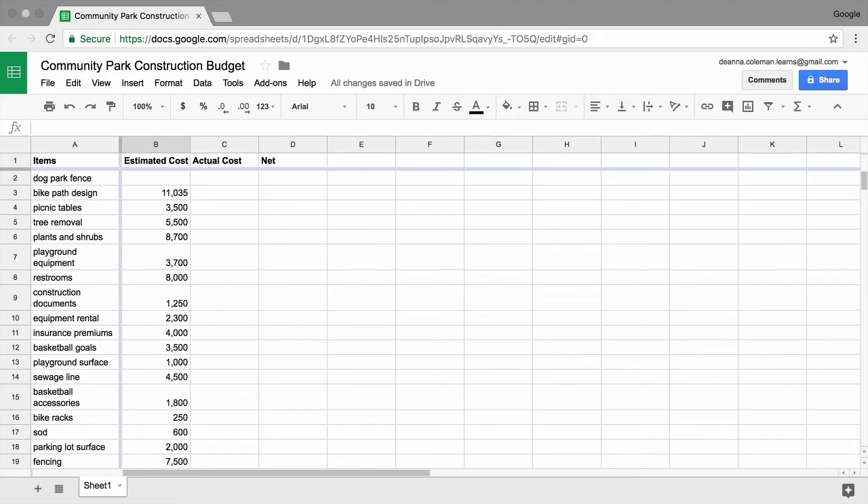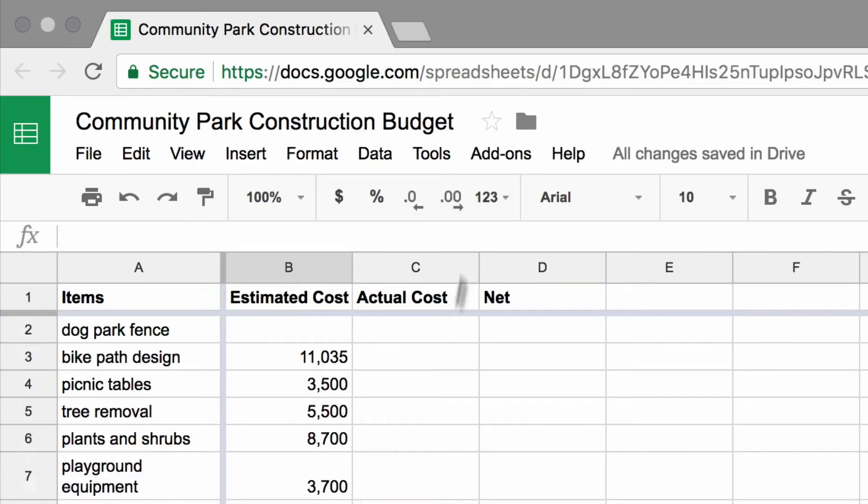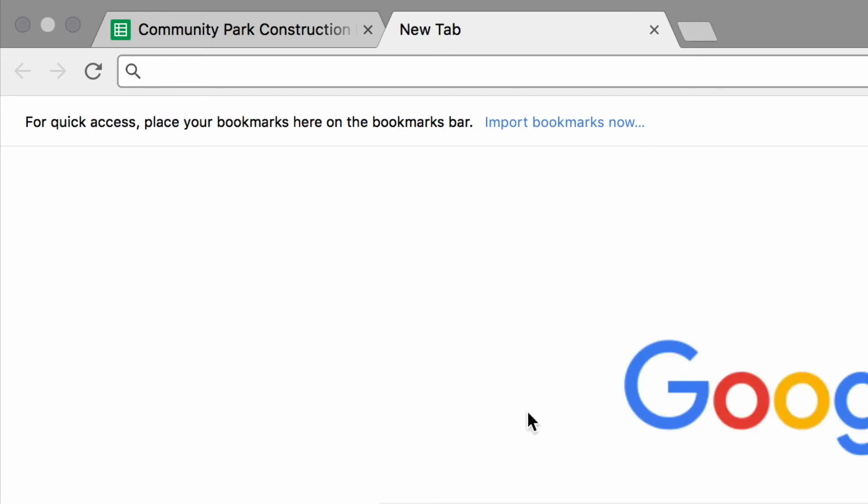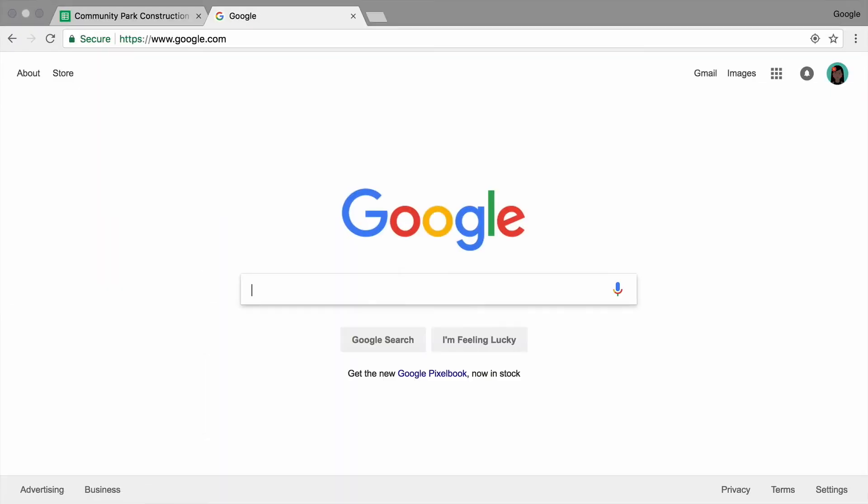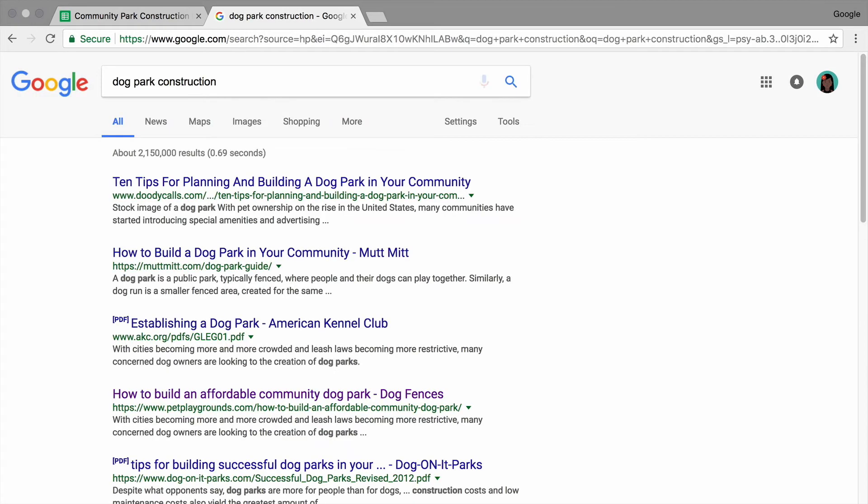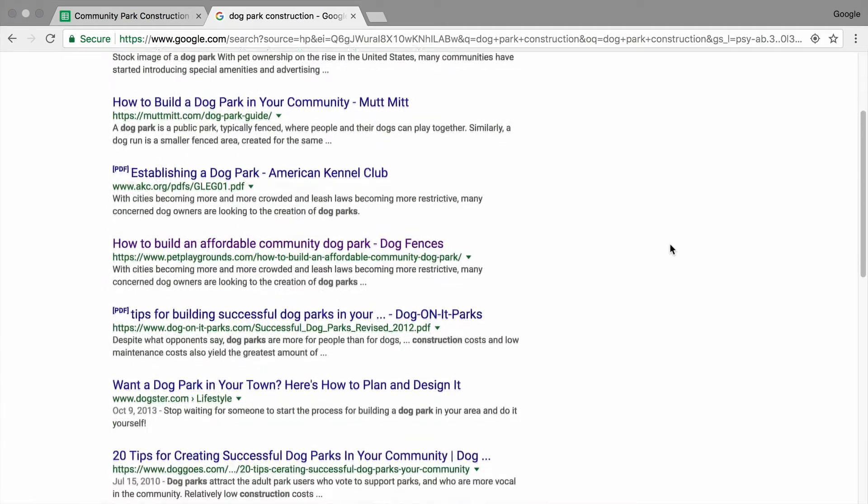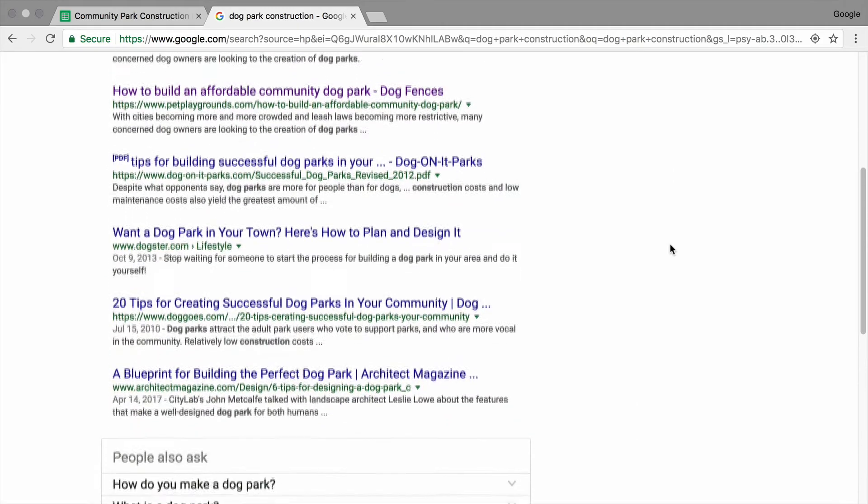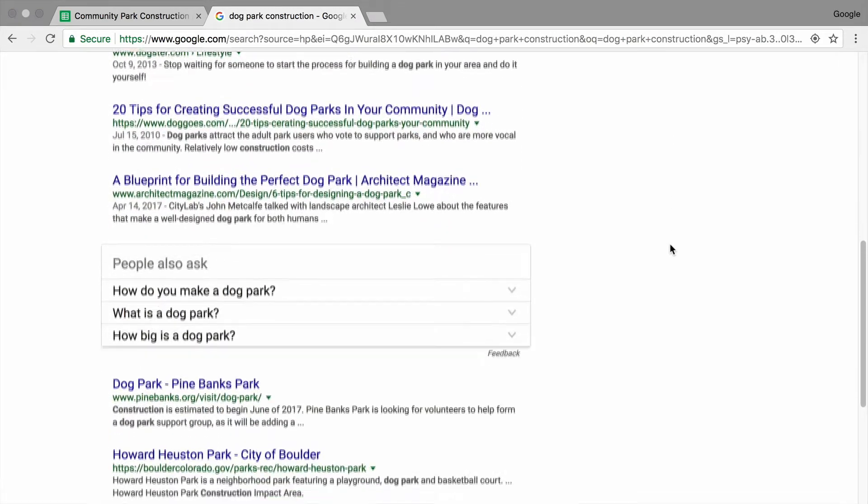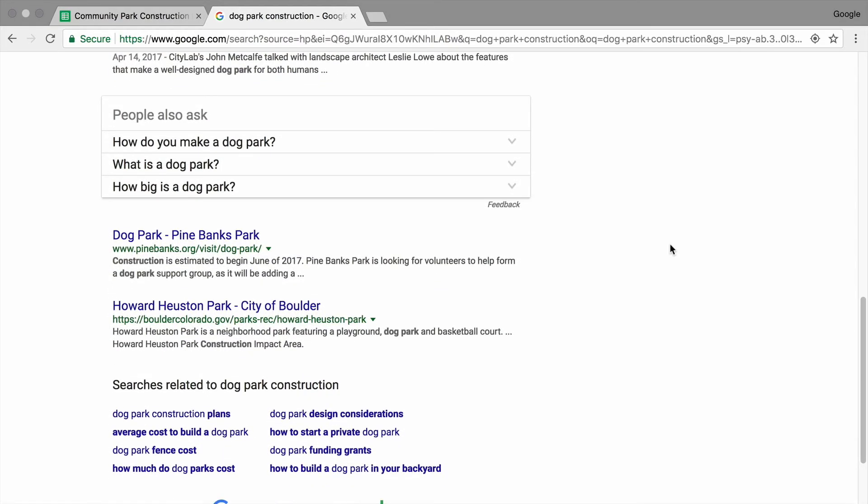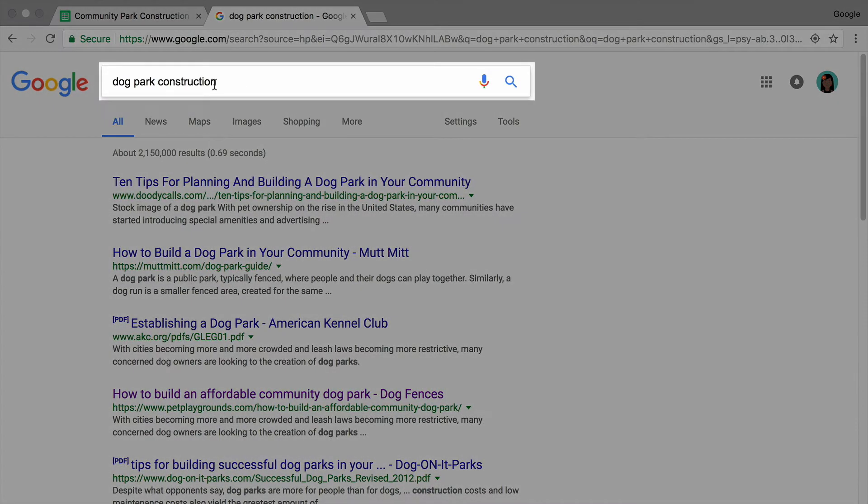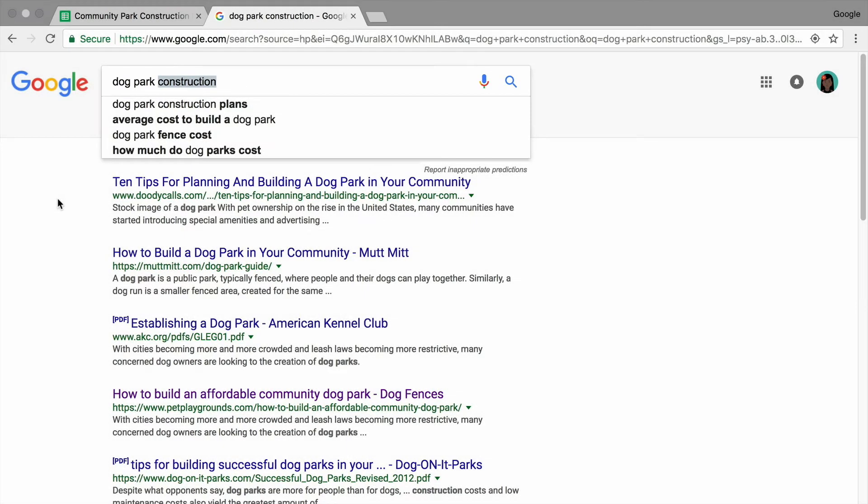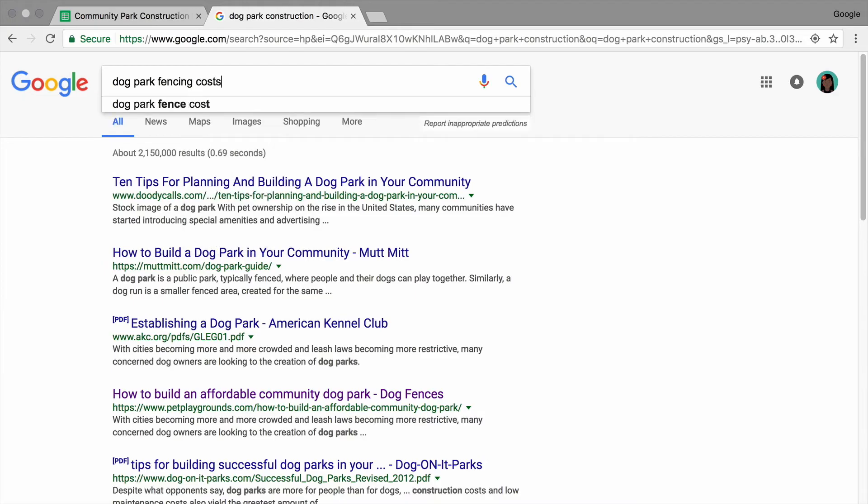To estimate project costs, you might conduct a Google search using terms that relate to a specific item or task. Scroll through the search results to find websites or documents that include cost information about similar items or projects. Narrow the search by typing in more specific terms about the line items in your budget.